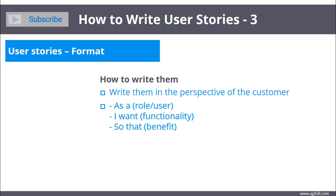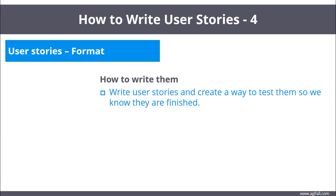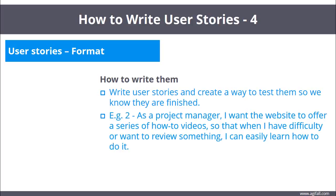So, let's take a look at an example: 'As a lover of picture taking on my cell phone, I want to be able to zoom in with high resolution so that I can take great pictures of nature and animals.' One valuable thing to remember is that when we write the stories, we need to be able to test them so we can know when they are finished. This is known as the acceptance criteria — the story is done and accepted by the customer, or it is declined. We need to write our stories so we can test them accordingly.